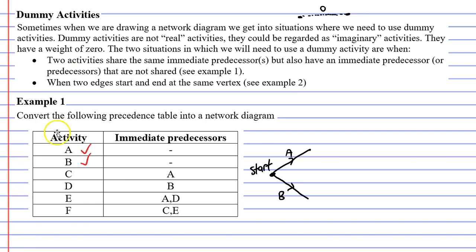Now moving on to activity C, it needs to come after activity A. So to finish activity A we put down a vertex and then activity C comes out from that point. So that's activity C completed now. Next activity D comes after activity B. So we complete activity B with a vertex and then activity D comes out from there. And we tick off activity D.